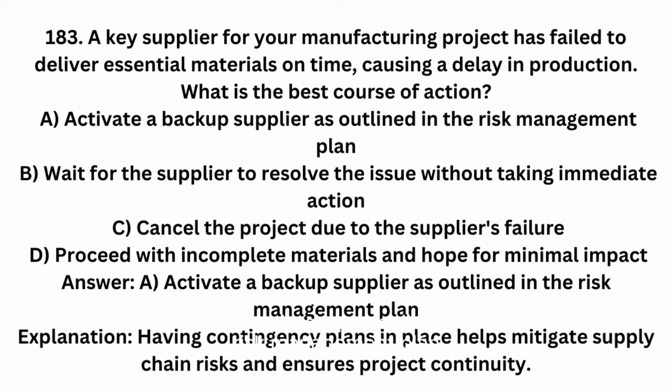Answer: A. Activate a backup supplier as outlined in the risk management plan. Explanation: Having contingency plans in place helps mitigate supply chain risks and ensures project continuity.